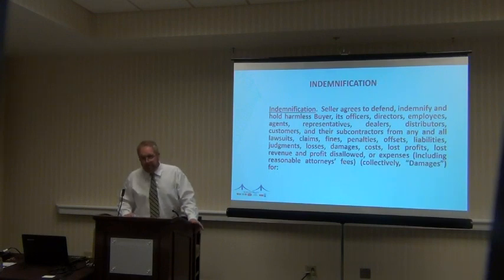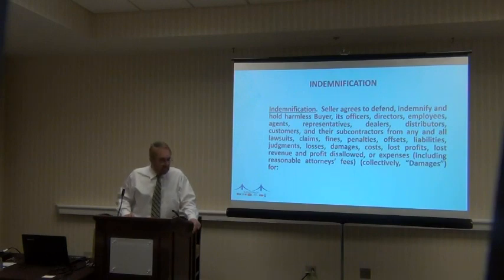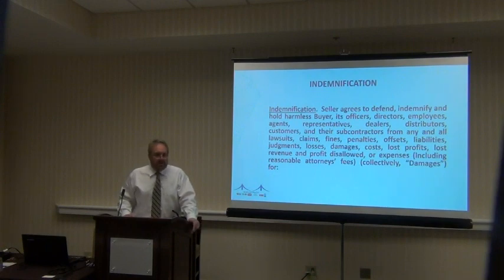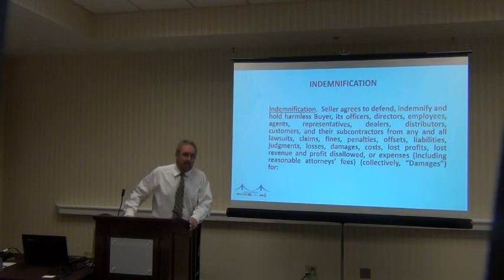There is a statute in Kansas, which we'll talk about a little bit, and since you've raised it, Jared, I'm going to go ahead and talk about it in a little bit. You don't have to write this down, just remember that it's out there. It's KSA 16-121, and it says indemnity in Kansas in a construction contract can only be given to the extent that the fault or the harm is caused by the party giving the indemnity.